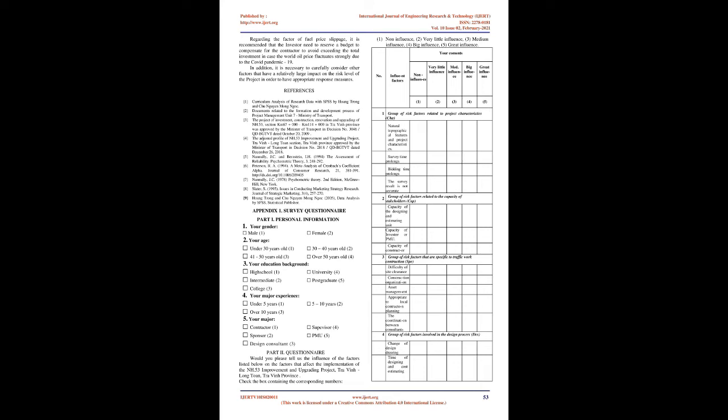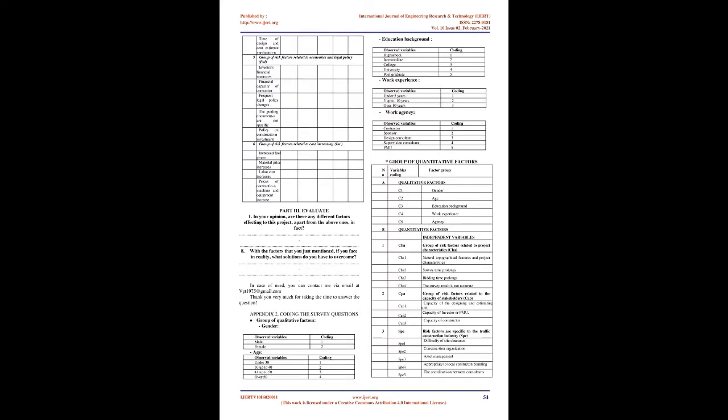Average values of observed variables from INC1 to INC4 in the group of risk factors related to price slippage are in the range from 3.84 to 4.47 on the 5-point Likert scale. Thus, most of the survey responses agreed that price slippage significantly affects the implementation of the Renovation and Improvement NH.53, Tra Vinh A Long Tone Section, Tra Vinh Province Project.